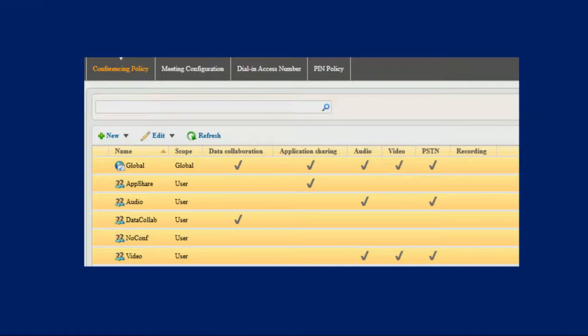If you then turn around and say, well, you can't really have that, we've just created another help desk call because now Billy Bob can't do what he did the day before. So you might want to think about assigning the conferencing policies when you create your users, but that would require you to have the conferencing policies all laid out before you started. Before you even got around to doing that first user, we need to be thinking about all of these things. Otherwise, we could be generating ourselves some really thorny issues.